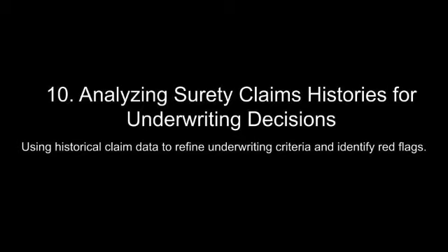High competition can lead to aggressive bidding practices, where contractors submit low bids to secure projects, potentially compromising profitability and increasing default risk. An analysis of market behaviors in the Strategic Management Journal highlights the need for balanced bidding strategies that consider both market positioning and financial sustainability.